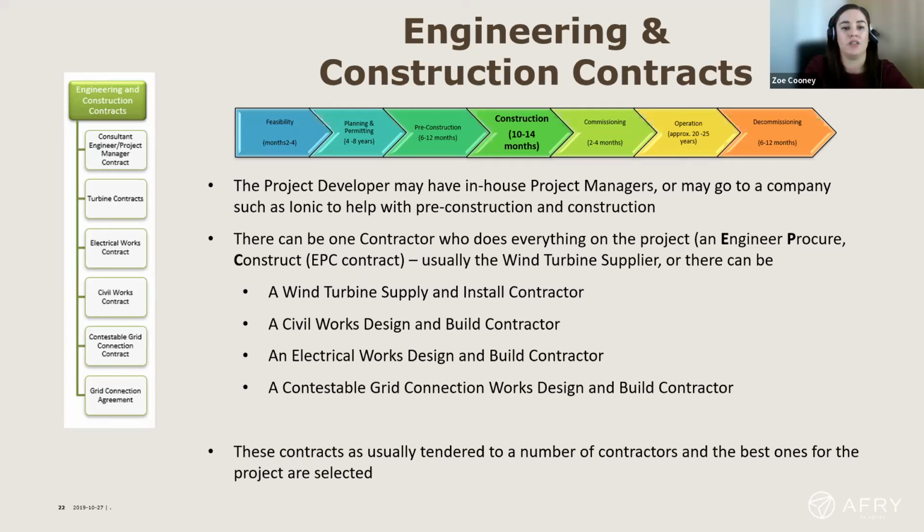And for these contracts to be put in place, there can generally be a tender process. Each developer is different. Any of the semi-states will have to go through public procurement, so there are set timeframes in terms of what documents need to be issued out, and how long a contractor has to review all of them and provide a quote back. Some independent developers will have their own timeframes, and other developers will have contractors that they're used to working with and they want to use them on the next project. So it's not an extensive tendering period by any means. The type of developer all depends on the time frame of the tendering to get those contracts granted, in terms of confirmation of who the contractor is going to be. And then there'll be a time frame to get all the contract documents agreed with each contractor.